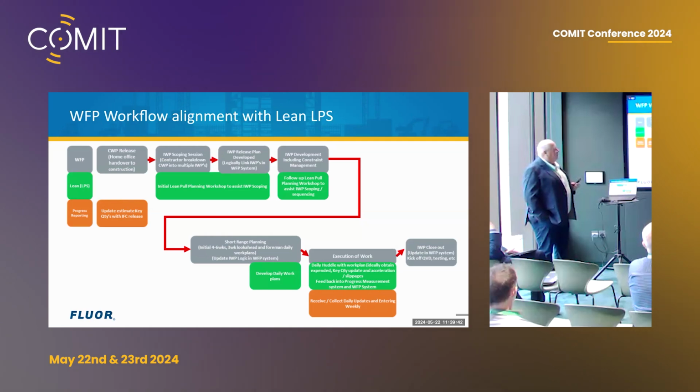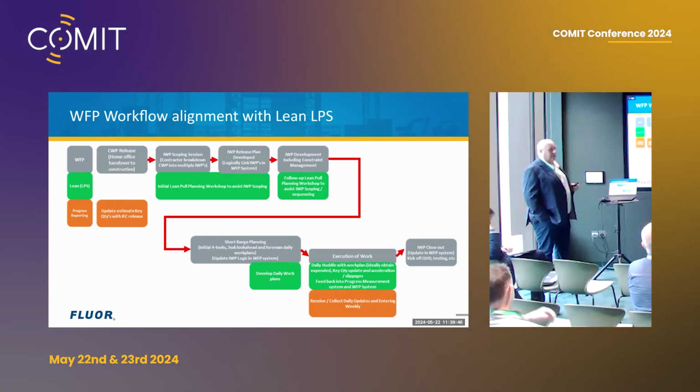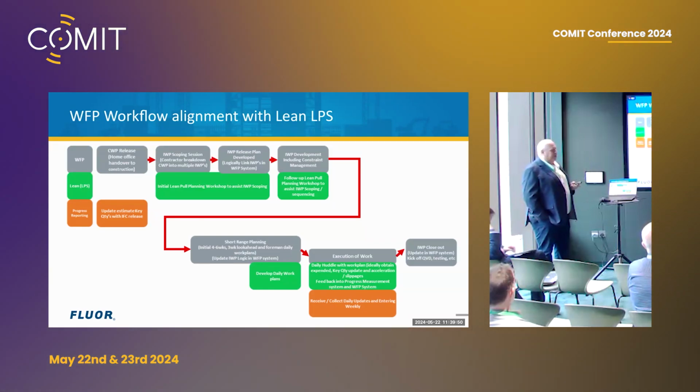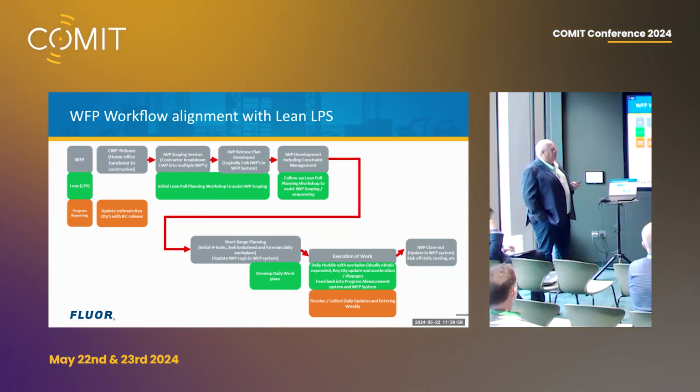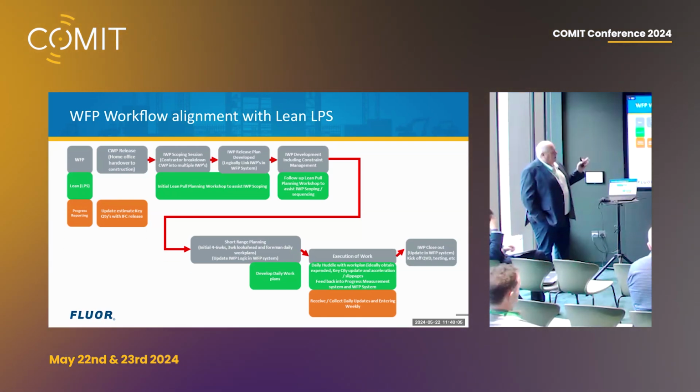But then when we go through our IWPs with our contractors, because obviously we're construction management, we don't build the job, we get them to break down the CWP into their work packages. And that's the same thing in Lean, called the pull planning workshops, just breaking it down to more detail. We then go through release plans, once they've started to find there's a few issues, and it's just a continuation of the pull planning workshops.